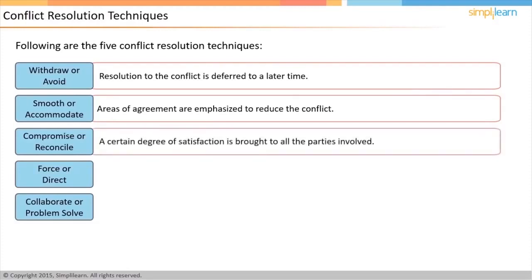In compromise or reconcile, there is some give and take in order to bring some satisfaction to all parties. Depending on how the process went, this may be perceived as a win-win or a lose-lose situation, because none of the parties really get what they want.